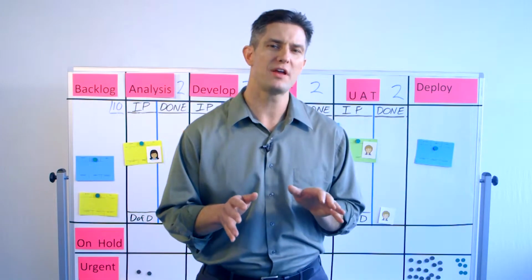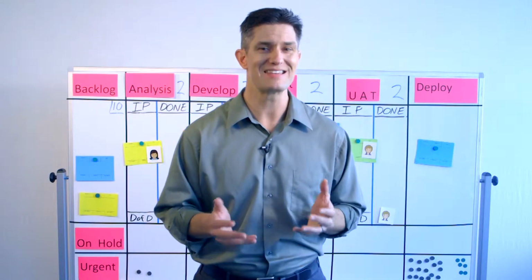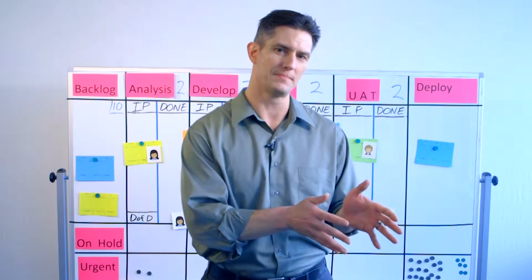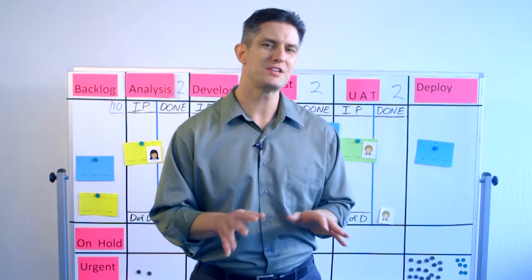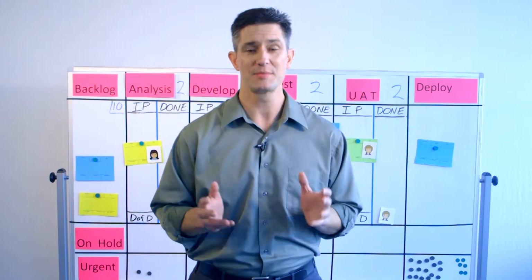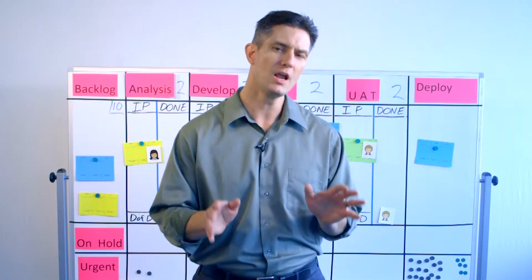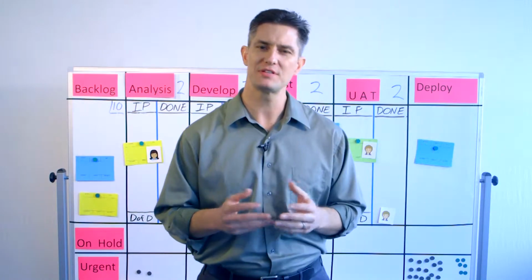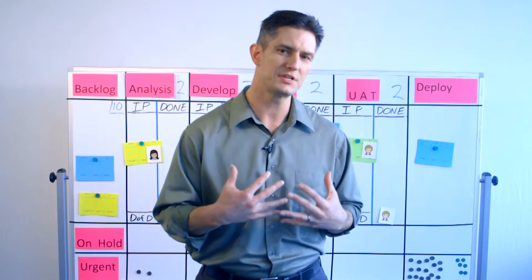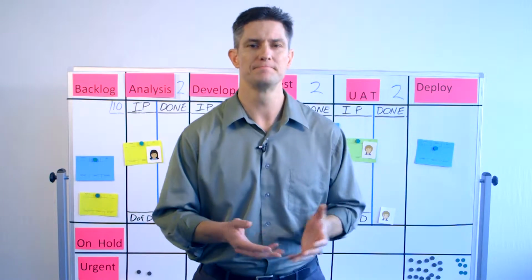The team should always favor finishing something over starting something new. When the team feels responsible for the entire Kanban system, then their most important outcome is to get something all the way to done. If this is really true, then each team member should be willing to help out to push other items over the line, but also, and sometimes more importantly, be willing to ask for help to move an item to completion. To help with this, I recommend changing the facilitator each day so every team member gets an opportunity and feels responsible for the whole system rather than just their own work, and can also get a sense of how the work is flowing.